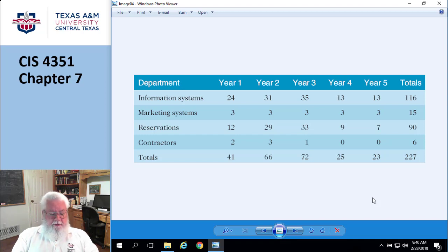One is the proof of concept. When you're putting together an estimate, you kind of sort of need to know, is this going to work? Are we going to do this? In the example of this case study, the proof of concept would have been, let's go ahead and get one kind of going, or maybe let's demo this one piece, and that way I know that this technology is going to work before I blow through the budget.